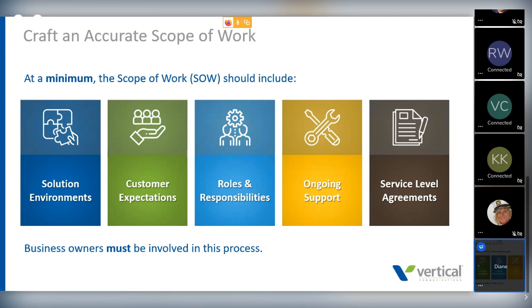All of these things could potentially be cost items as you move through there if they're not laid out during this particular step. Customer expectations. This is huge. What do you expect of the solution provider? Have you thought about who's expected to do the design? How will it be done? Who will do the training? What kind of knowledge transfer documentation are you expecting at the end of the deployment from the solution provider?